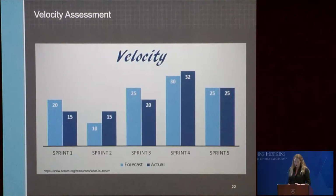the expected and actual cost per story point per sprint by doing a simple conversion. This could then be used to adjust the cost estimates, including labor hours or remaining work. So no matter how progress is reported, it's measured the same in all Agile and Scrum projects. Using start to finish, which is either 0 or 100% complete, there's no partial credit taken for in progress or incomplete work.